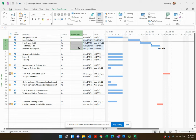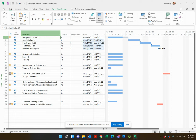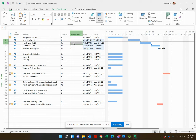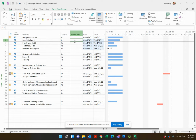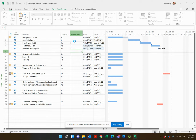Behind the scenes, Microsoft Project has just put the numbers in the Predecessors column. Alternatively, you could delete those predecessors and just come in and start typing the predecessor numbers: 1, 2, 3, 4. That's it — simple as that. Those are two of the easiest and quickest ways to link tasks in Microsoft Project.